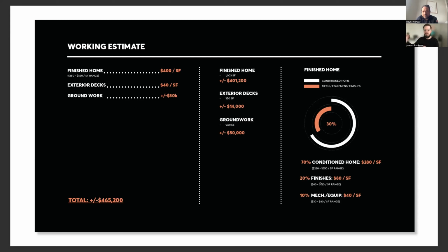So that's a very important marker for us, especially when we're working with clients that have some more unique things that they want us to bring into the project that we don't necessarily know the prices of up front, and to make sure that we have a check, that we're not just bringing in tens and tens of thousands of dollars of unique things, but maybe we're investigating other manufacturers or other types of finishes that have a lower cost point that can allow us to do a lot more on budget to really get you what you want.